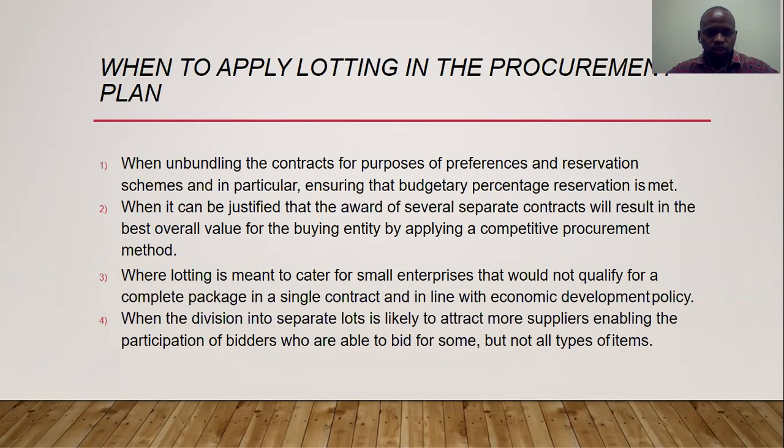you can decide to apply lotting. Then the other important aspect is when lotting is meant to cater for small enterprises that do not qualify for competition for a complete package. So you can decide to lot basing on the fact that you are going to give various enterprises who do not qualify for a particular bid a chance. Then when the division into separate lots is likely to attract more suppliers, enabling participation of bidders who are able to bid. So basically, if your essence is to ensure that you invite different people to come on board to compete for a particular bid, then you can decide to use lotting.